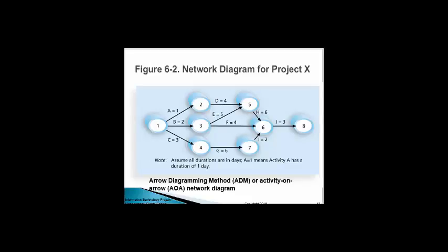is actually an arrow diagramming method, which is also called activity on arrow. It shows the activity as the letters and the duration with the numbers. And we'll have to later find the critical path, use it to find the critical path. So letters A through J represent activities with their dependencies that are required to complete the project. And the activities come from the work breakdown structure, of course. The arrows represent the activity sequencing or the relationship. And we see that activity A must be done before activity D.